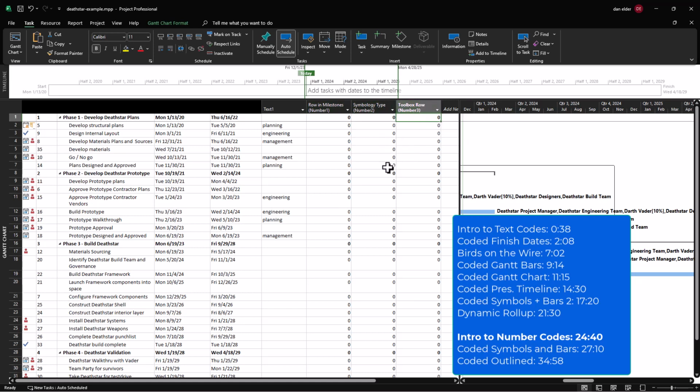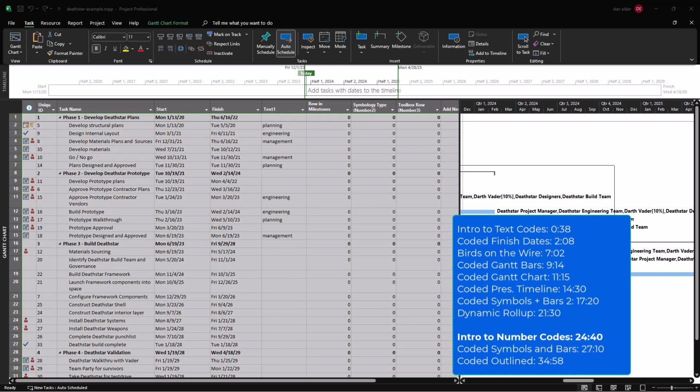So for each of these tasks, we can set exactly what row we want it to be in the milestone schedule. We can set the symbology type, which I'll talk about in a few seconds. And then toolbox row, that'll be the number of the toolbox row that you want the symbology to come from. Then you also have an optional title field, which will be placed to the left of the task row. Or you could just set up your schedule how you want it to be labeled, and not even automatically bring over a title field. It's optional.